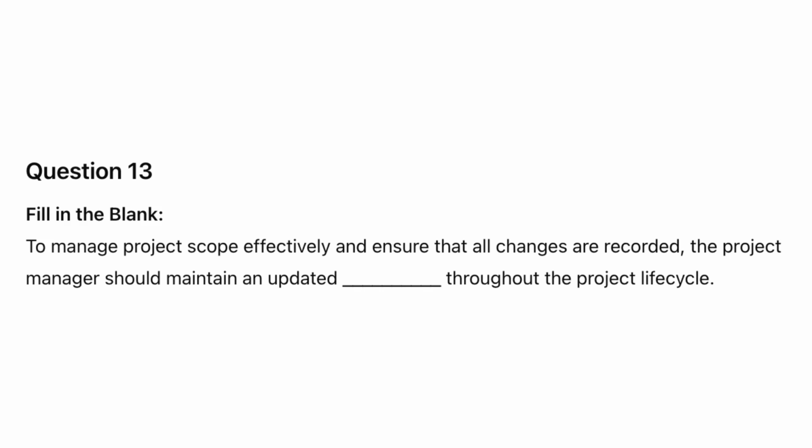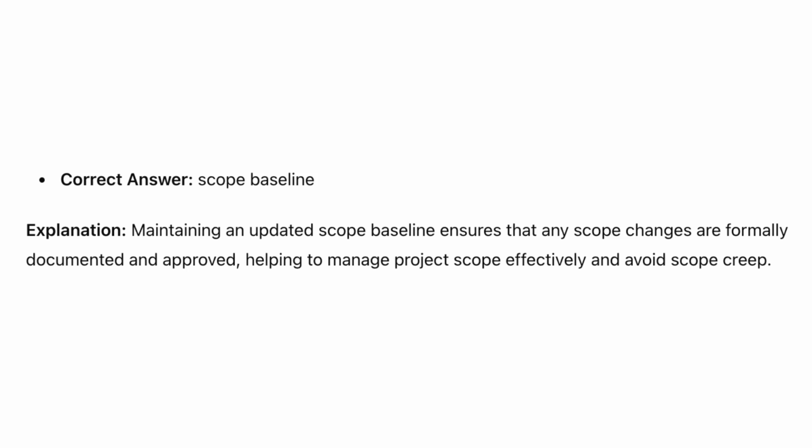Question 13. Fill in the blank. To manage project scope effectively and ensure that all changes are recorded, the project manager should maintain an updated blank throughout the project lifecycle. Correct answer, scope baseline. Explanation, maintaining an updated scope baseline ensures that any scope changes are formally documented and approved, helping to manage project scope effectively and avoid scope creep.